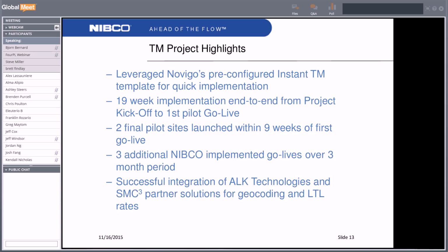While the skeleton of our TM system was being built out, we were able to begin some prototyping activities in parallel using Novigo's system, while making the project team a little more in-product oriented from the very start of the project. And once our system was built, we were able to then copy that configuration and all of our prototyping activities over into it and continue our own work in our system.